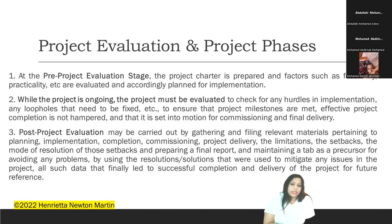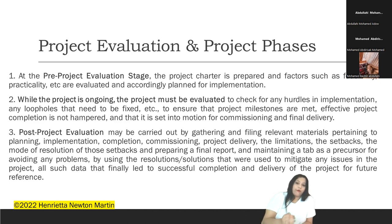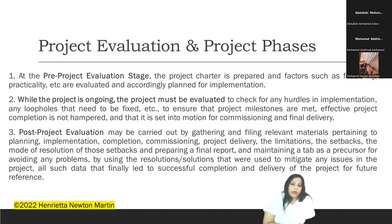Project is evaluated at the beginning — the pre-project evaluation stage — where the charter is prepared and factors such as feasibility, practicality, and so on are evaluated, and accordingly planned for implementation. Feasibility means whether it's possible considering different factors: the cost factor, the area, the possibility, the practicality, whether how pragmatically the project can be launched. It is pre-project evaluation stage, and then it moves towards the next stage of planning for implementation. Then you move to while the project is ongoing — the project must be evaluated even while it is implemented, to check for hurdles in implementation, any loopholes that need to be fixed, to ensure project milestones are met, effective project completion is not hampered, and that it is set into motion for commissioning and final delivery.